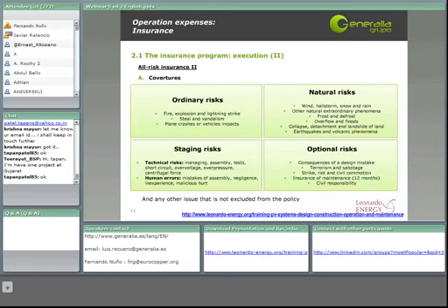Here we won't have the surveillance system because the plant is not being operated yet, so we have to consider the possible thefts of the materials during the execution. A good practice could be stocking the materials in an area closed with a fence, and the critical materials such as the inverters could be stocked in a room with a lock.